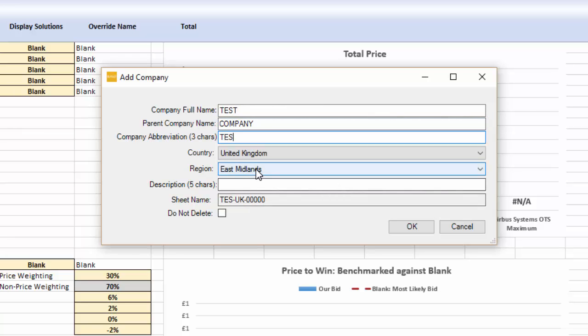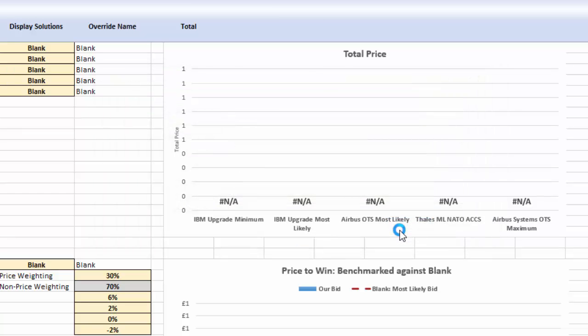Now, the whole point of doing this is because we want to be able to account for different overhead structures. And by overhead structures, we're talking about the way in which a company converts a cost into price. Okay, so we want to be able to look and see how the different cost buildup that we're going to model could turn out to be a different price depending on which company it was, or depending on different levels and the way in which the supply chain was modeled. Okay, so this is really important. And as we get into modeling some of the costs, you'll be able to see how this affects things.